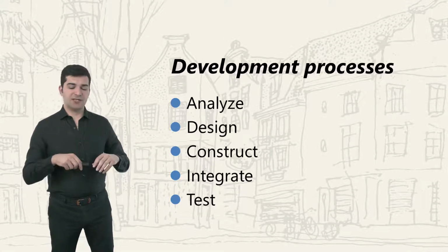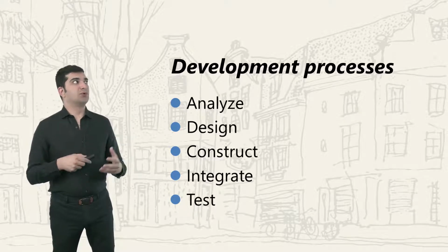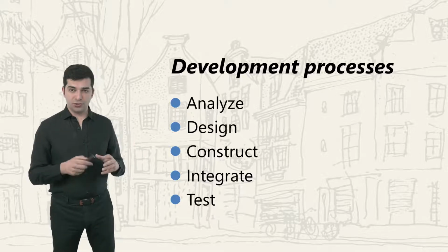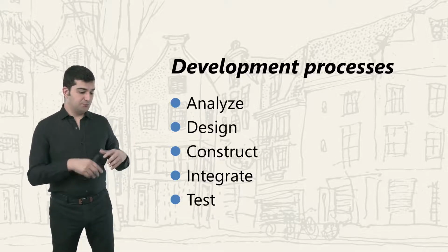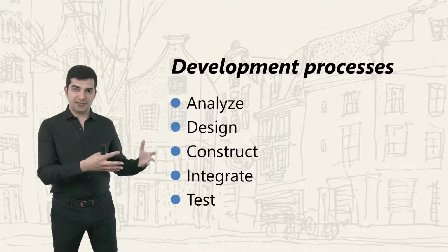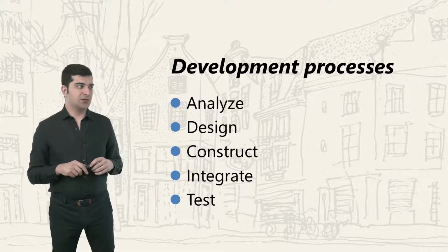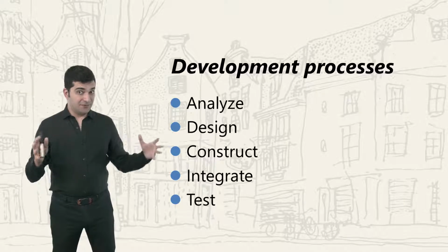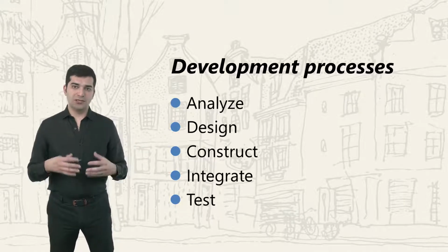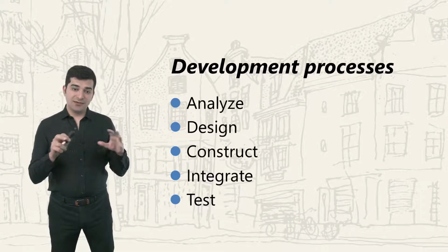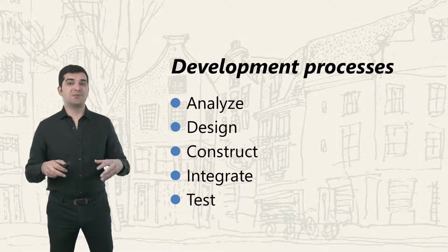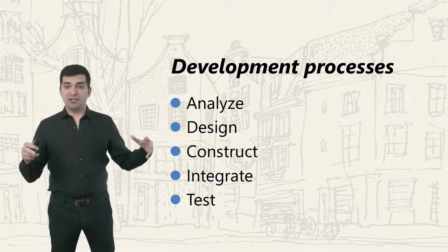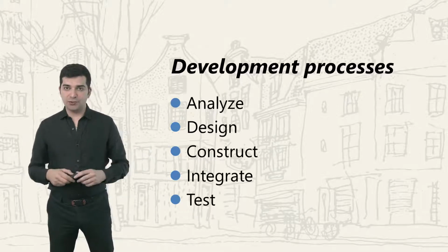In a process plant project, for example, you have development processes such as basic design, then you have detailed design and procurement for each of your units. Then you construct and assemble and install each unit. Then you have some type of unit test isolated from other things. And then type of integrated test with the load and everything else. And still, these development processes for a process plant doesn't explain everything that you have to create there. You have other things, for example, the building inside which you will have those units and so on.